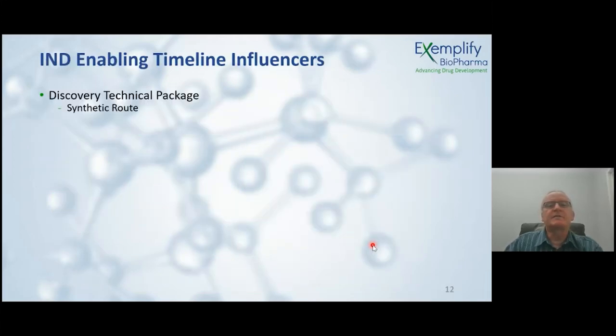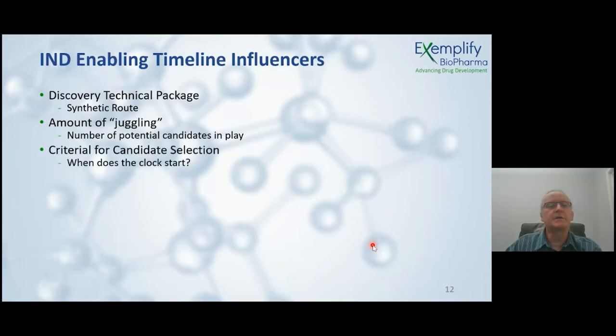So what can influence that timeline? What can make that longer or shorter or more or less complicated? Obviously, the technical package that comes from the discovery folks: what does the synthetic route look like? Then the amount of what I call juggling. Having 1 or 2 candidates in play is a little easier to manage than having 8 or 10 candidates in play and trying to figure out which one you want to go forward with. It can cause a lot of complexity.